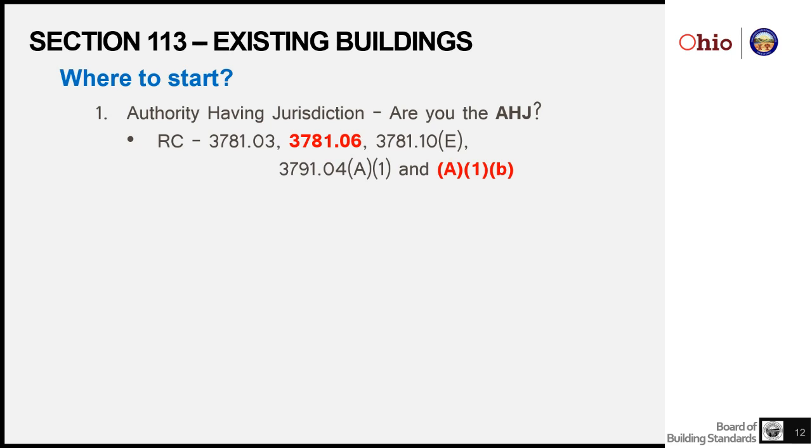And the result of that is that without a plan approval, there's nothing to inspect to, and without satisfactory inspections, a certificate of occupancy can't be issued.